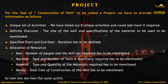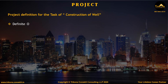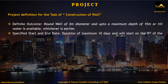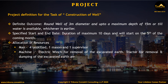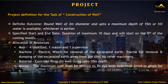So now let's see how the same activities have to be listed to be considered as a project. Project definition for the task of construction of well. Definite outcome: round well of three meter diameter and up to a maximum depth of 15 meter or till water is available, whichever is earlier. Specified start and end date: duration of maximum 10 days, starting on the 5th of the coming month. Allocation of resources — Man: unskilled labor, one mason and one supervisor. Machine: electric winch for removal of excavated earth; tractor for removal and dumping of excavated earth away from site; no other machinery. Material: concrete rings for well lining up to 10 meter depth. Money: the maximum cost shall be limited to a certain amount with individual breakup given for each resource and activity.